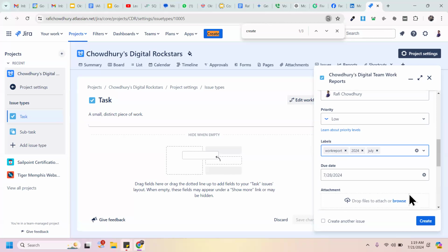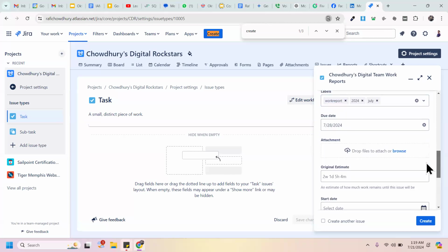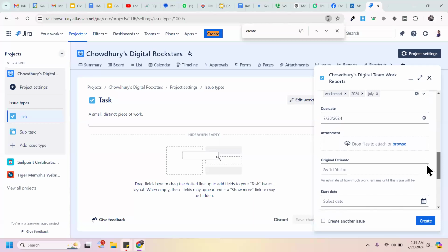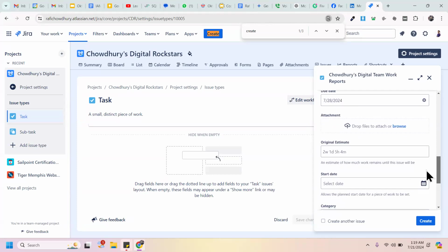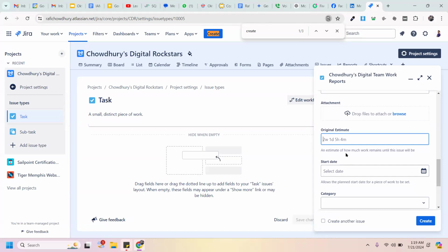Got it. Right. Now next is due date. Due date is something like I mentioned, where you capture when you are going to deliver that piece of work. That is also something which we capture on the ticket, and it basically feeds into the roadmap or Gantt chart, where you specify by which date you're targeting to complete that piece of work. You also have a start date as well. So the start date and due date are nothing but your start and completion dates.